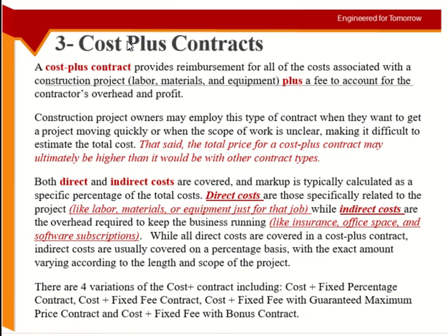One thing. And the other thing is, we talked about it last time as well, the additional risk. The contractor is still taking some amount of risk. And there is risk in this project because you never know what the client may say eventually. So he may quote a higher profit than what he quotes for lump sum or unit price. Because now he's calculating the profit for the whole project without knowing about the work.